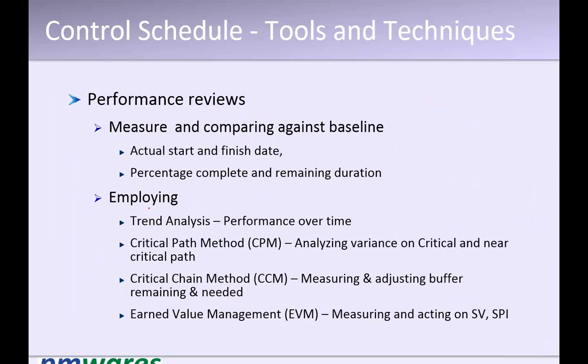So here, when you are saying the change request, is it a change request in the schedule? Correct. So it's more of an internal thing, correct? Basically for the project manager's purpose. PMI change requests which we are seeing as an output of these things are not external change requests, not a change in scope. It is a change in the existing plan.